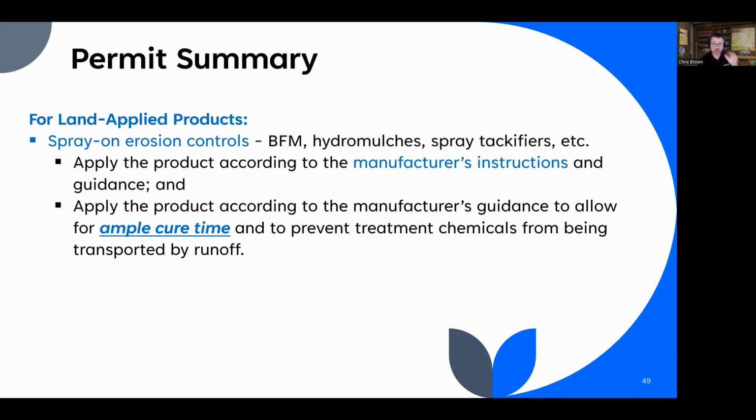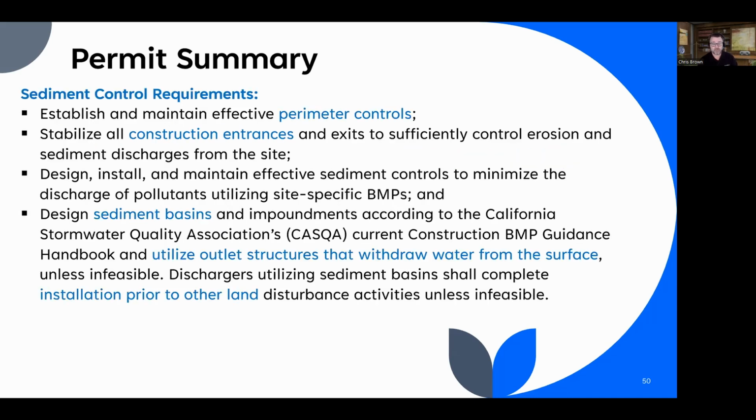Curing time is now required. So anything that's got a curing time, tackifiers, hydromulches, whatever the case may be, they need to be applied, and the curing time needs to be observed. This is a permit requirement, so you can't apply these things 2 hours before a rain event. That wouldn't be compliant. You have to follow these requirements, so people need to prepare for rain.